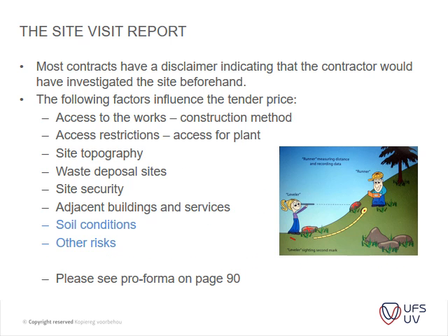Then just looking in depth at some of the items that we looked at, the site visit report. This is one which is usually neglected, as most contracts have a disclaimer indicating that the contractor would have investigated the site beforehand. So please be mindful of that.